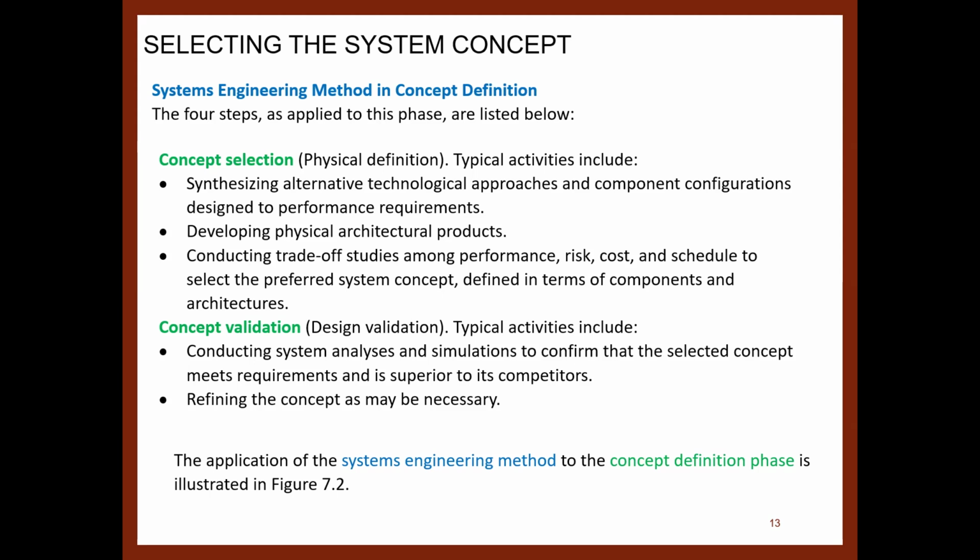And when you get to this point, concept selection, you have to get to conducting these trade-off studies among the performance, the risk, the cost, the schedule to select the preferred concept, right? So now you have these different performance metrics, risk, performance, cost, time that it's going to take you to implement this. And you start comparing, okay, between these two, which one is the best? Do all that trade-off that I think I showed you some algorithms to perform that. You can revisit some of those lectures.